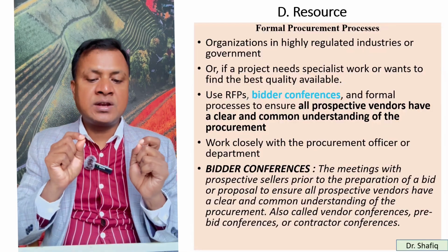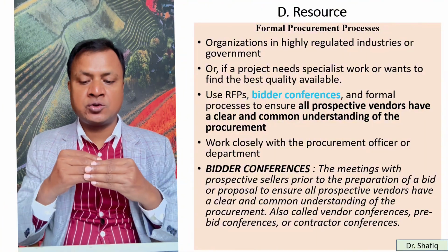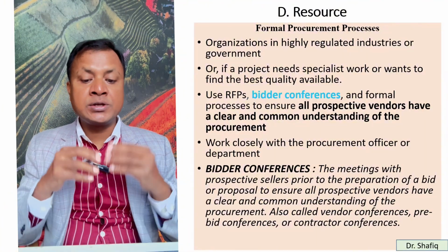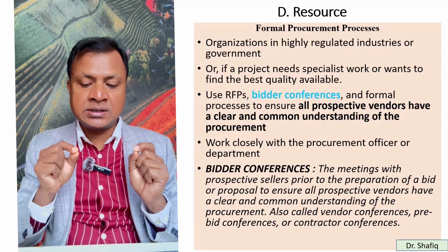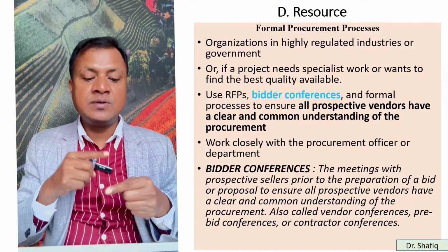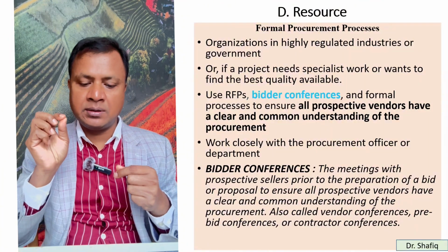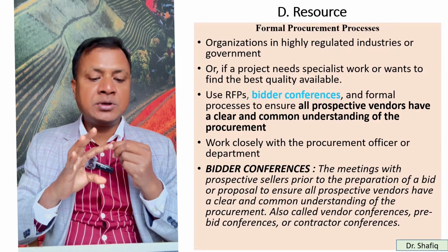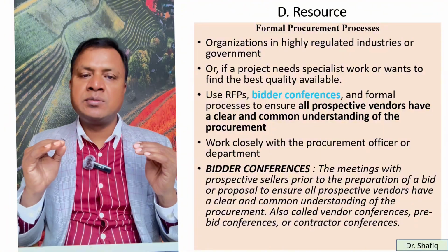So bidder conferences are meetings with prospective sellers prior to the preparation of a bid or proposal to ensure all prospective vendors have a clear and common understanding of the procurement, also called vendor conferences, pre-bid conferences or contractor conferences. So there are four names but same thing: vendor conferences, pre-bid conferences, contractor conferences or bidder conferences. It's the same thing.